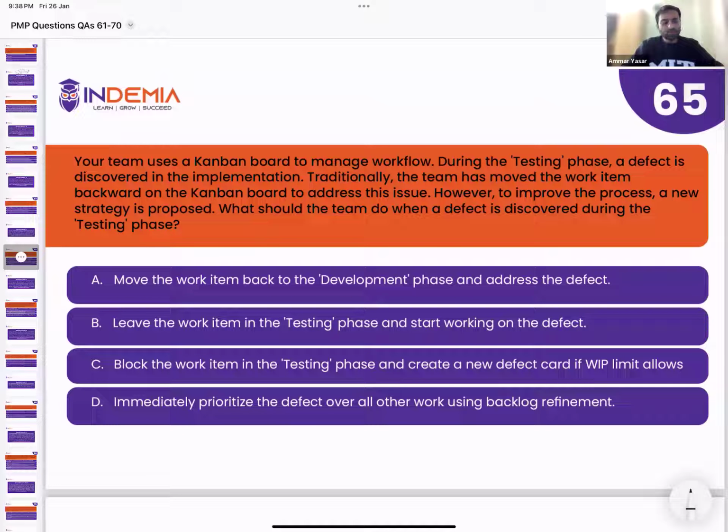It's not like that you have 100 hours and there are 2 defects which require 10 hours, then your sprint would be disturbed. It means you will be solving the defects, but maybe you won't be completing the important task. So you don't know what's the priority. So you will put this in the form of a card, reprioritize, and then execute. So this is how defects are handled. Remember, I explained it clearly in the class, any action item should go back to the backlog and it should be reprioritized and then it would be executed. So let's read the explanation.